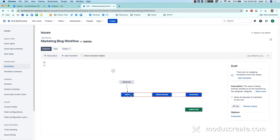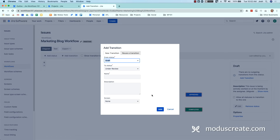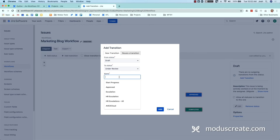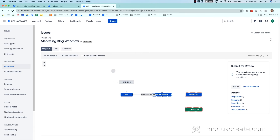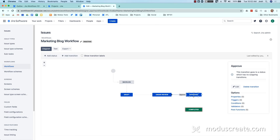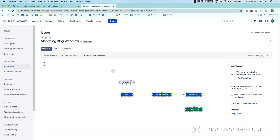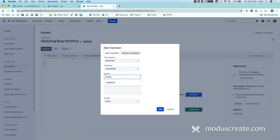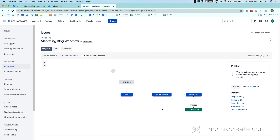There you have it — you can see our diagram has been updated. An easier way to create transitions is through the diagram itself. You can see the connection points on the status; if you hover and select one of these connection points and drag, you can create connections that way. This also pre-populates the from and to status, which I like better. So going from draft to under review, a transition that makes sense would be 'submit for review.' And once under review, 'approve' would be a good transition. Then at the final step, from approved to when the blog is completed, we're going to call this 'publish' — that's a bit more descriptive of what's actually going on.